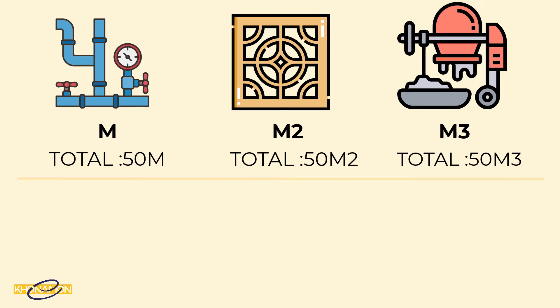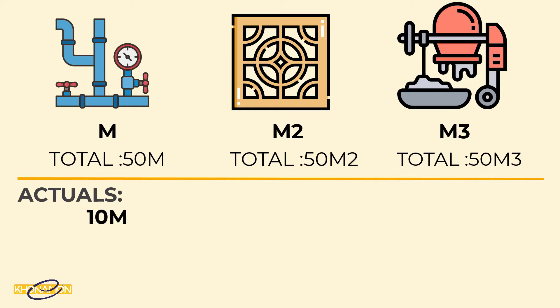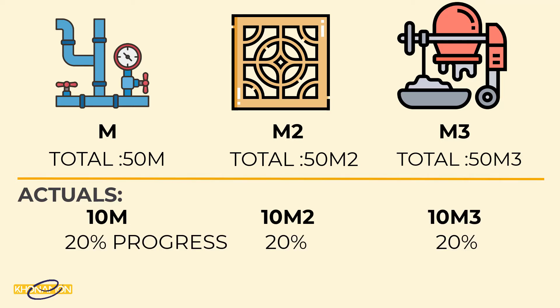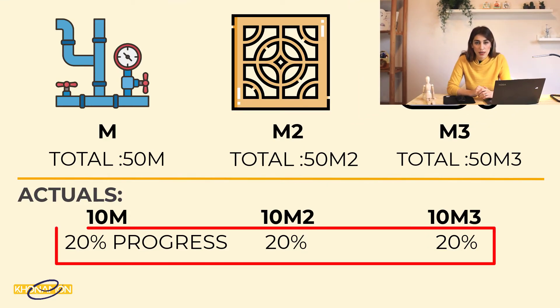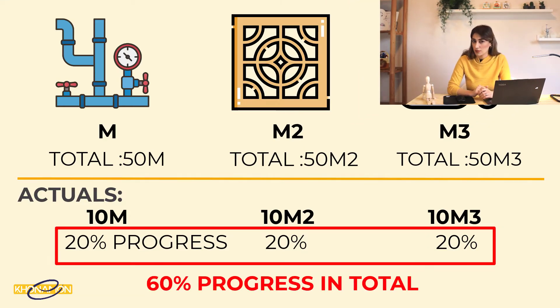The project continued and we got the actuals in the first week: 10 meters of piping, 10 square meters of ceramic, and 10 cubic meters of concrete. So we have 20% progress in each activity. In this way, can I say in total I have 60% progress in my project? Is it right?